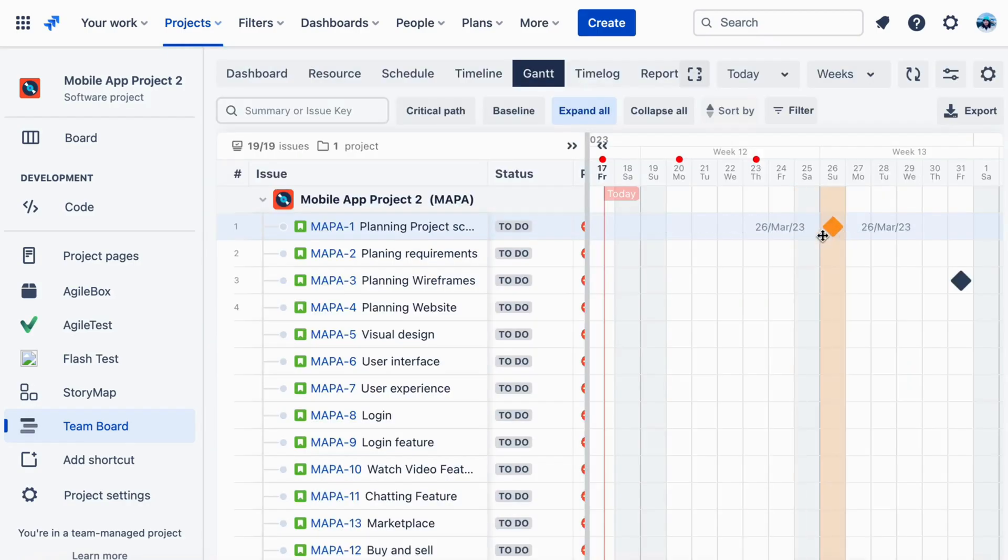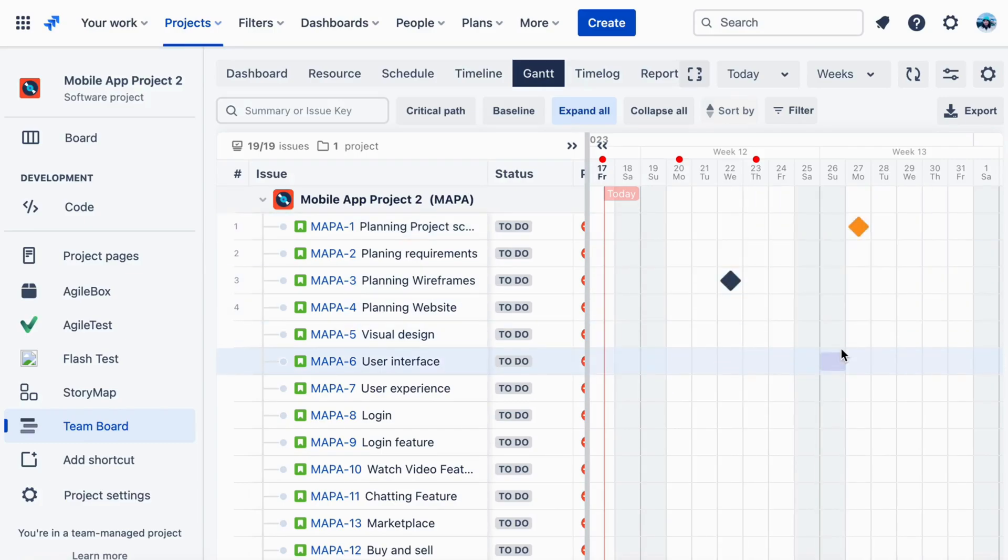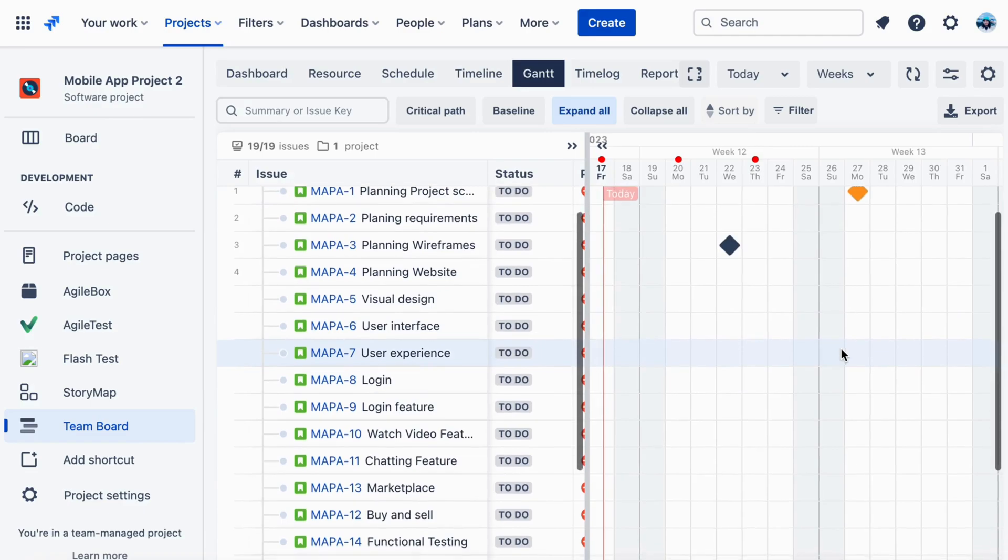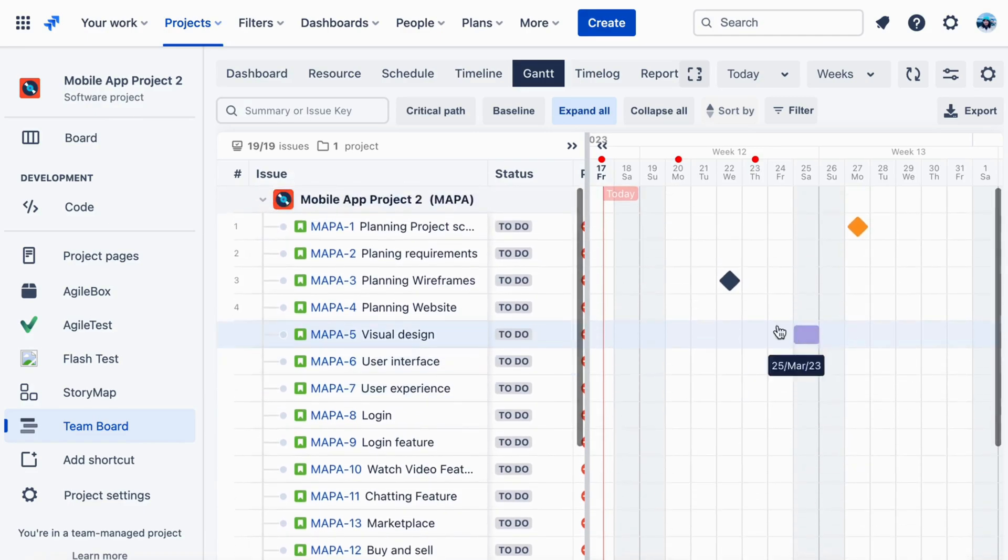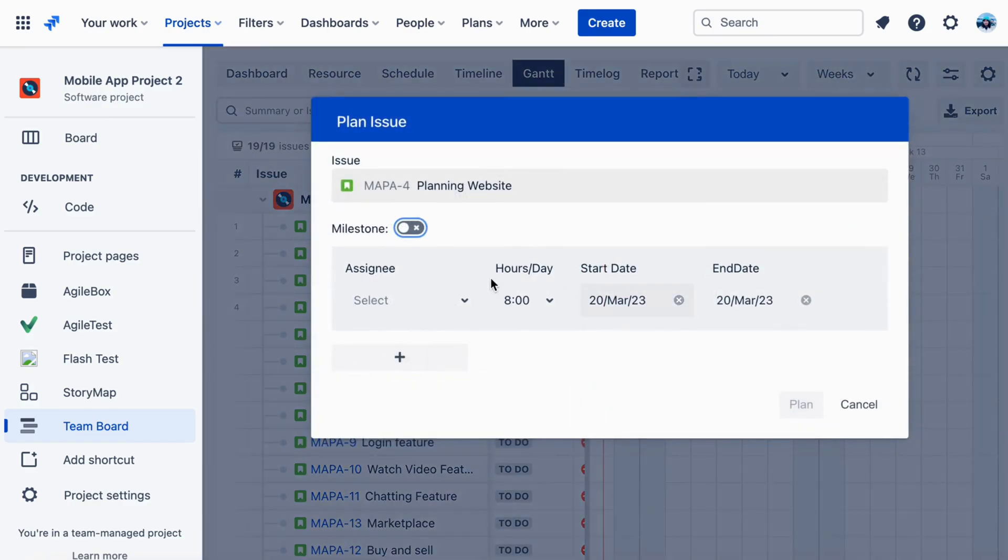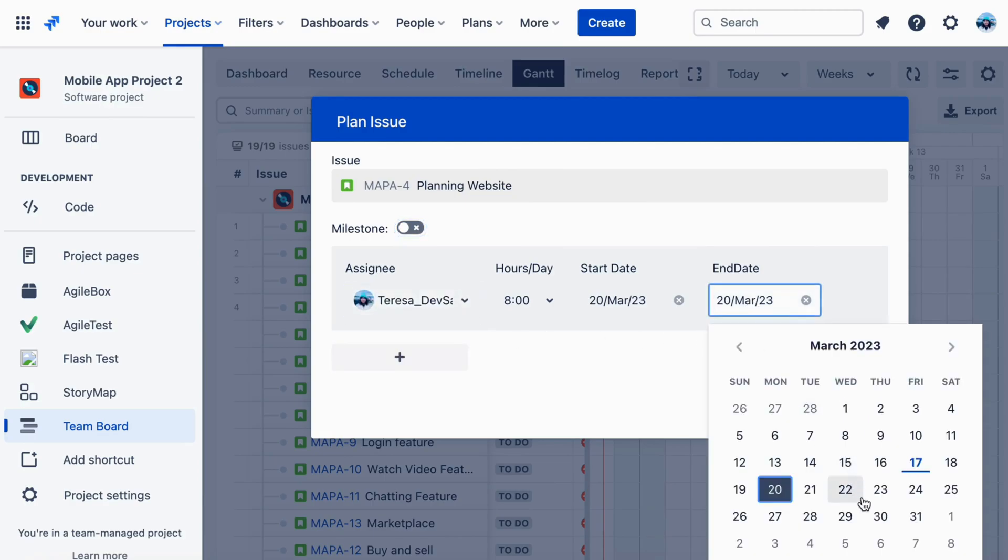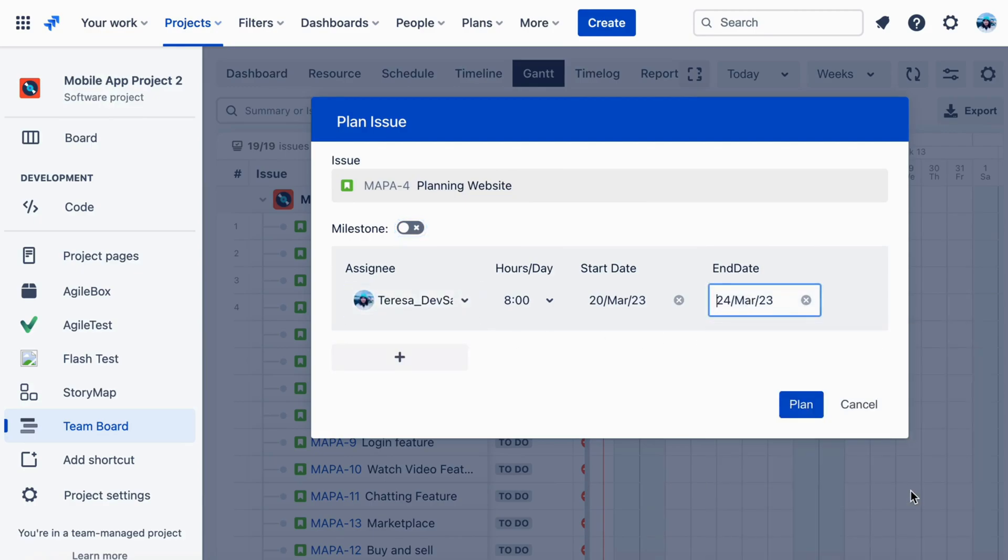You can then drag and drop the milestone to the appropriate place in the timeline. Repeat this process for each milestone in your project. By setting up Gantt milestones in the TeamBoard in JIRA, your team can easily track progress and stay on top of important deadlines for your mobile app development project.